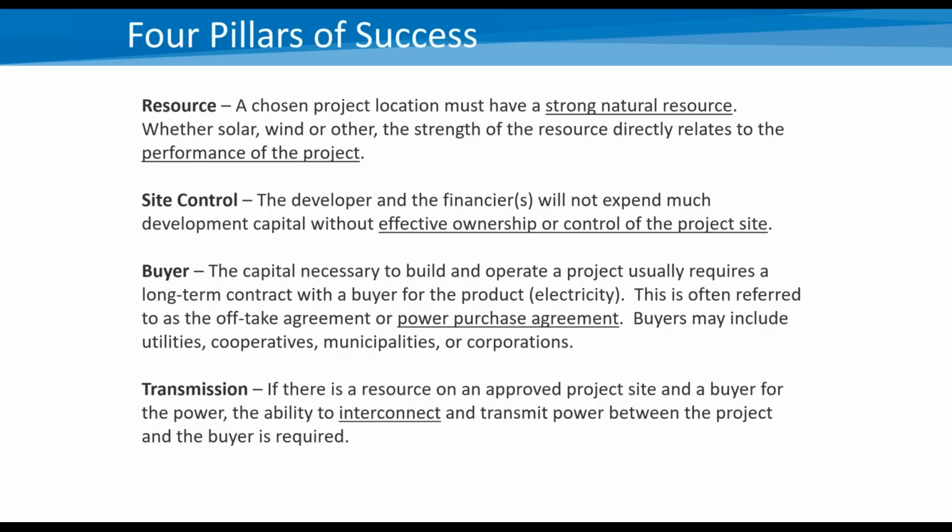The third pillar here is the buyer, and that's, if you've got a long-term contract with a buyer for the electricity, that's usually considered the holy grail for a power generation project. If you can get a 20-year or 25-year PPA, power purchase agreement, that is the linchpin for successful financing. It gives the investor a measure of assurance that their investment is likely to pay off.